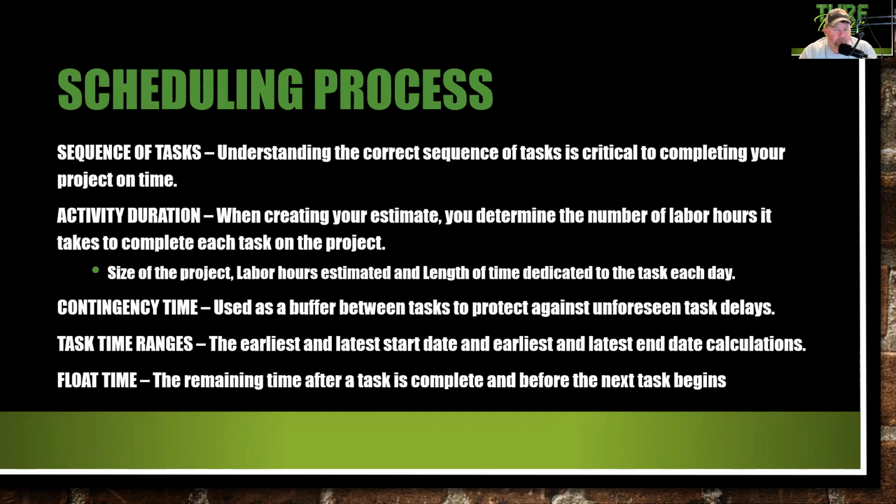Float time, the remaining time after a task is completed before the next task begins. All right, so you've poured footers. When can you go in and do your concrete? When can you start your retaining wall? Well, you've got to wait on the surveyor to come back and pin the footers. So it's usually like a day or two. But between each task, there is going to be some float time.